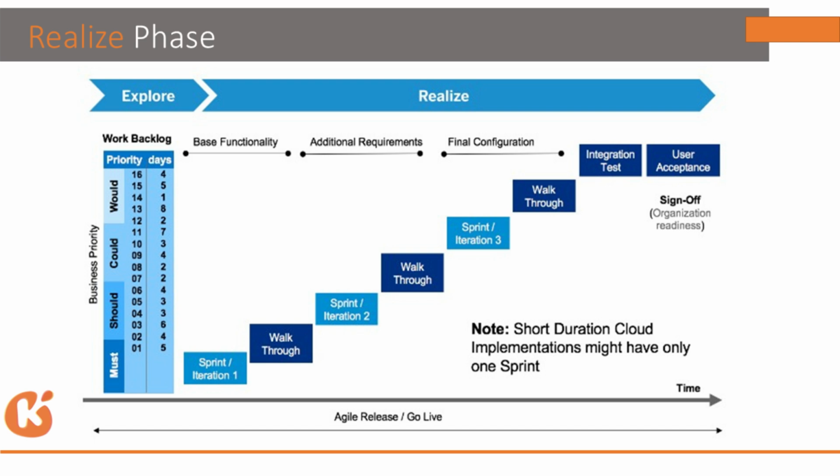Now we have seven steps. One is the company structure, one is the personnel structure, one is the pay structure, one is the wage type structure, the fifth is the option structure, and finally integration, I mean third-party integration and posting. In this sequence, what do you take care of in iteration 1? Iteration is nothing but grouping together one particular important piece with which you can do the configuration. It is not that you take all requirements. You cannot do everything at a time, right? So whatever requirements you take, you split them. Say I have taken 10 requirements from the client.